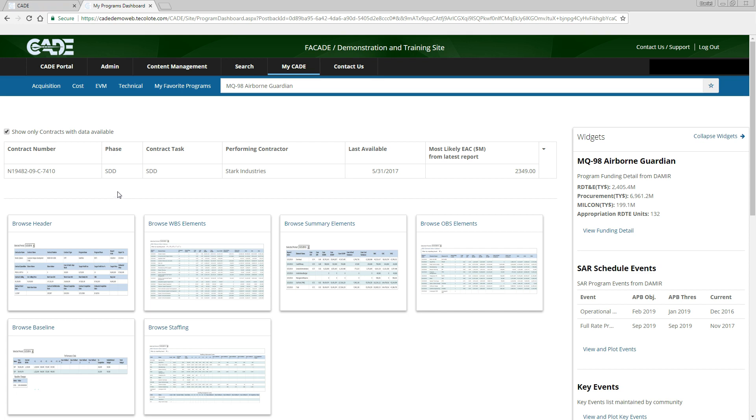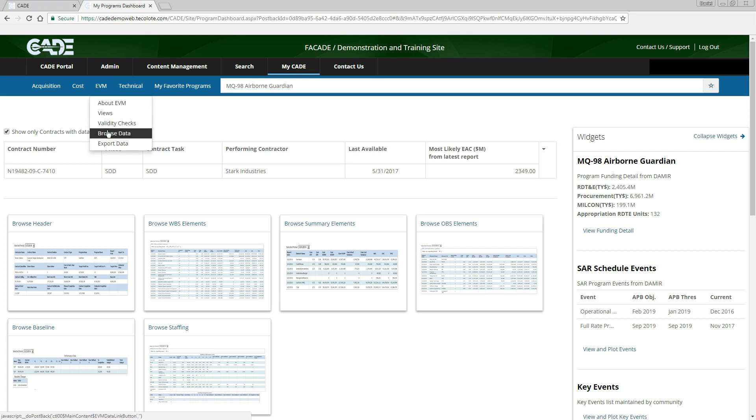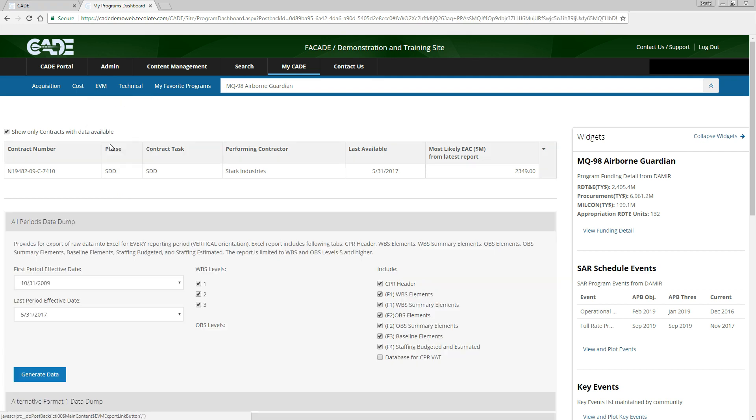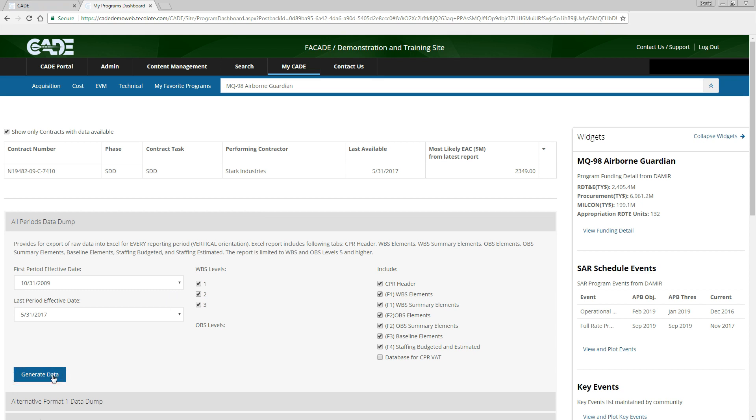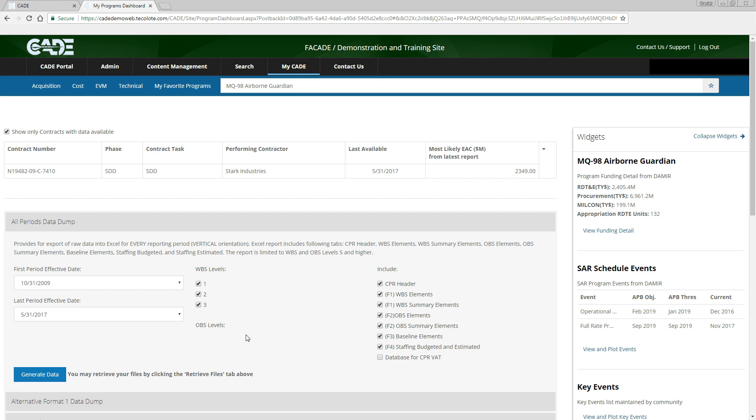To export EVM data, navigate to the EVM tab in the menu bar and select Export Data. To export as an analysis-ready flat file, make the appropriate selections in the All Periods Data Dump section and click the blue Generate Data button to generate the job in the queue. Note that by default, All Periods and IPMR formats 1-4 are selected.